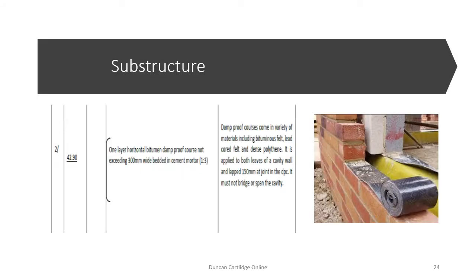A damp proof course or DPC is required for both skins or leaves of the external wall. Bitumen damp proof course is supplied in rolls 30 metres long. At the junction of the rolls, the damp proof course is lapped 150mm. But when taking off quantities, this is not taken into account and the DPC is measured net. Once again, the estimator should make an allowance for this when pricing the bill.